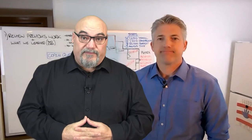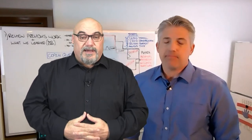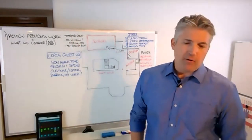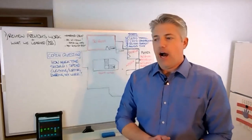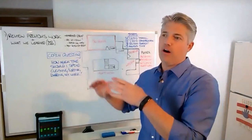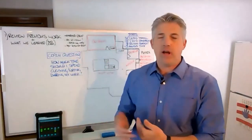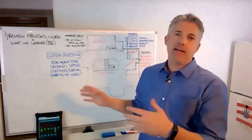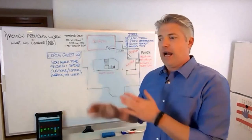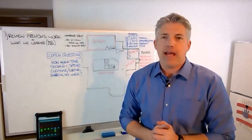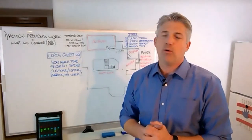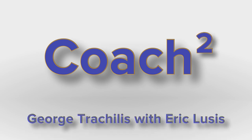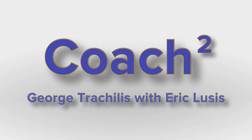Great. Is there anything I could have done differently? So Eric, what do you say to that? Yeah, I should have worked harder to pull forward critical path activities. I relied too heavily on replacing the window to initiate framing in a certain area, when I could have moved to the other side of the room and possibly got more critical path work done versus just workable backlog. Okay. This is the coach's coach. Sorry, let's do it again.